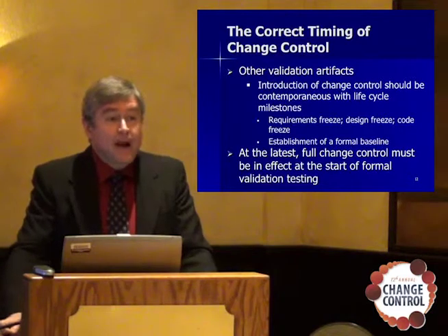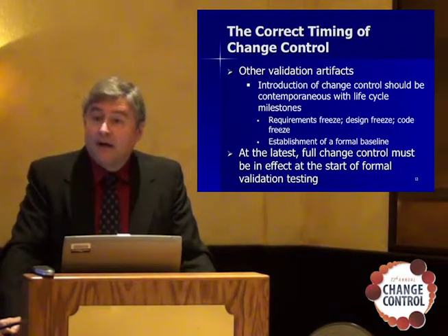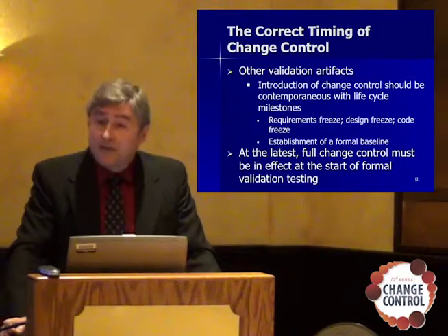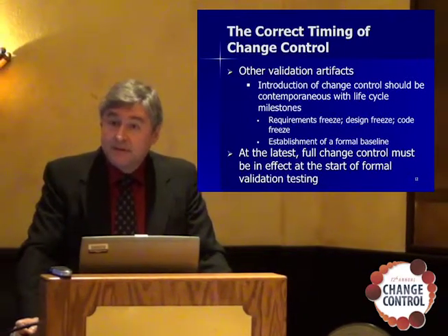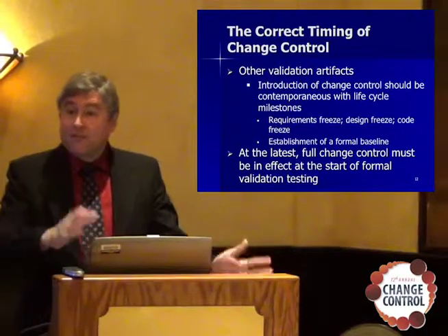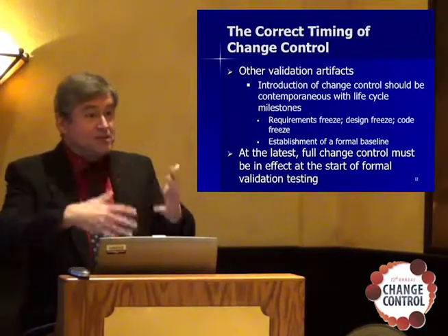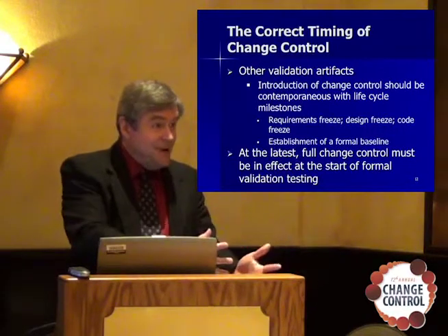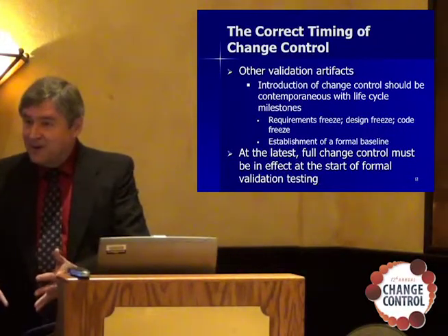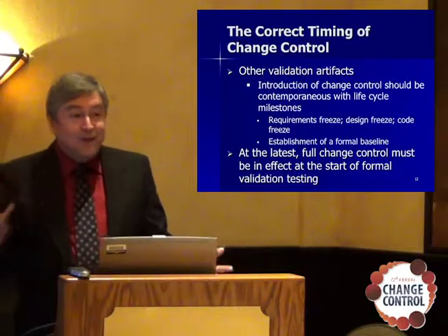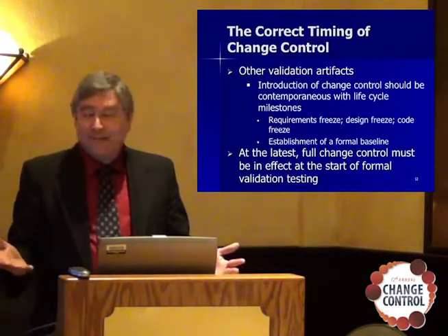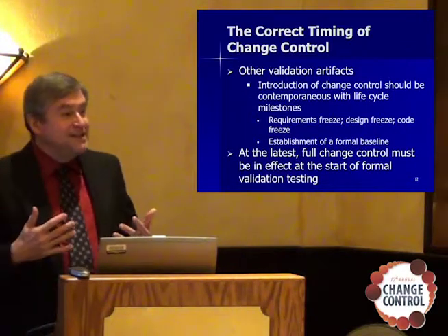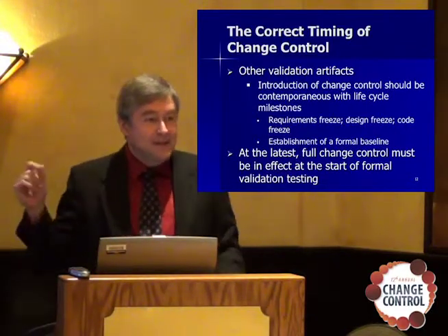Now this was interesting when I was working on a project involving a global finished goods labeling system. There were a lot of different parts in this system. There were printers with firmware. There was a master labeling system that had a label design module and a label printing module. And they all had their own release numbers. We must have had a dozen configuration items all being tracked with individual configuration release numbers.